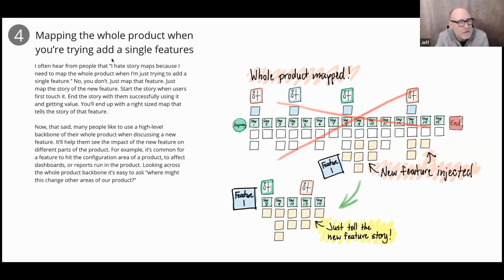Now, the other thing I didn't point out here, but it's in the quick reference, is to use the concept of goal level that comes from a guy named Alistair Cockburn, where we look at steps that people take from a goal level perspective. Goal level is something you would start doing with the intention of finishing it before you do something else. Again, when I teach people story mapping and they write down take a shower, I'll explain, well, taking a shower is goal level because you don't start taking a shower and then say, wow, this is really getting boring, I'm going to go grab a cup of coffee and I'll finish my shower later. That's not the way it works. You start with the intention of finishing it.